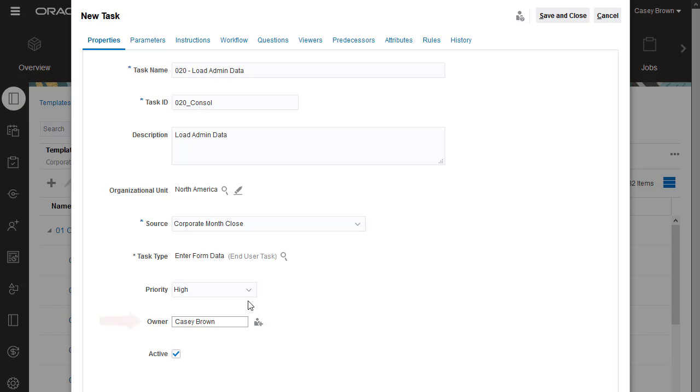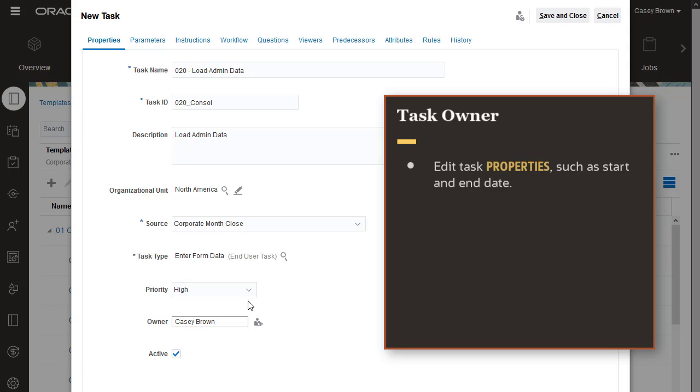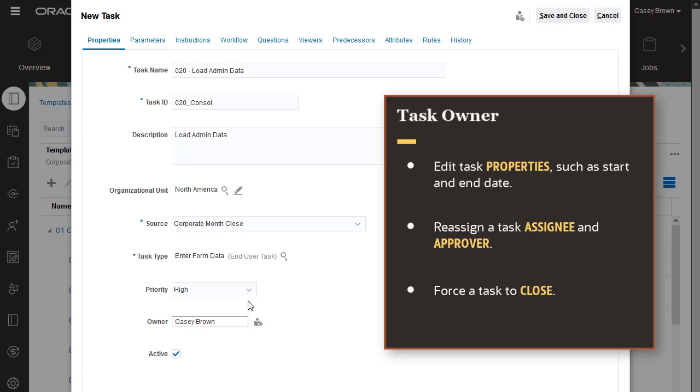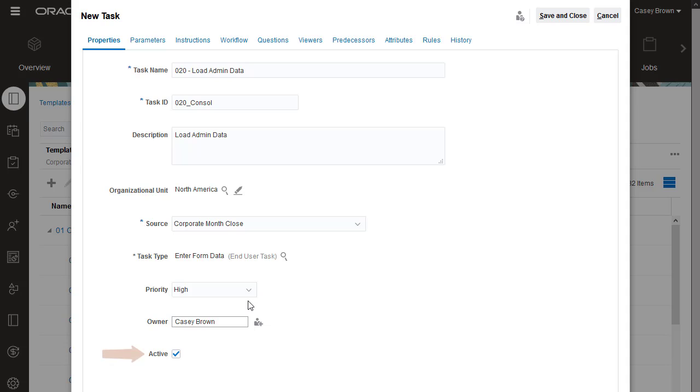The task owner is the manager of the task, but not necessarily the assignee. The owner can edit the task properties, such as start and end date, reassign the task assignee and approver, and force the task to close. Tasks default to active. Only active tasks are included when you create a schedule from the template.